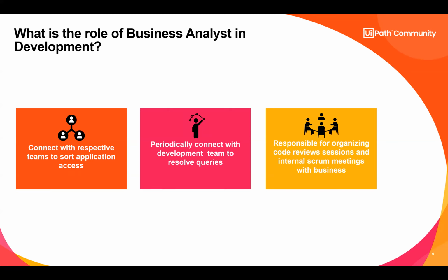The solution architect will be reviewing your code and giving you his comments. If your code is good, you will go through to the next phase. If it's not in a proper convention, he will give you some feedback, like you need to do some changes. The developers need to do those changes and again go for a code review session. Now for organizing these sessions, in some organizations it might be the role of the developer himself, but when you have a business analyst, even a BA needs to conduct those sessions. He will also be responsible for explaining the solution to the solution architect from a functional standpoint.